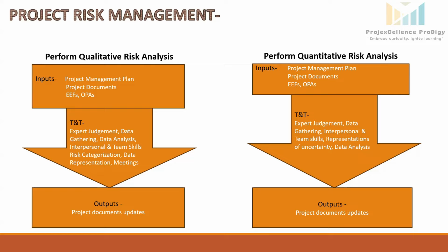Data gathering, like interviews. So conducting structured interviews with project stakeholders to understand risk probabilities and impacts. Data analysis means the risk data quality assessment. We are checking if risk-related data is reliable and complete. For example, if site survey data for soil conditions is incomplete, what will happen? The risk of foundation failure for the solar panel structure may not be accurately assessed.